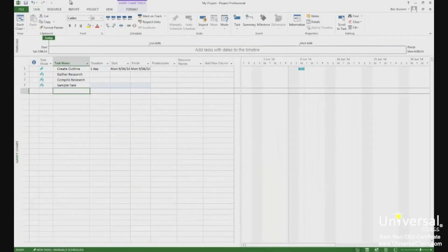Sometimes a task will start and you'll find that you need to put it on hold while you take care of another issue or complete another task. Or maybe you realise that there will be a delay in the task when you create it and want to structure it so that it takes a break and resumes later. You can easily remedy either of these scenarios in Project by simply splitting a task. When you split a task, you create a break in it with no activity occurring for the task during the break. You can create as many splits in the task as you want.